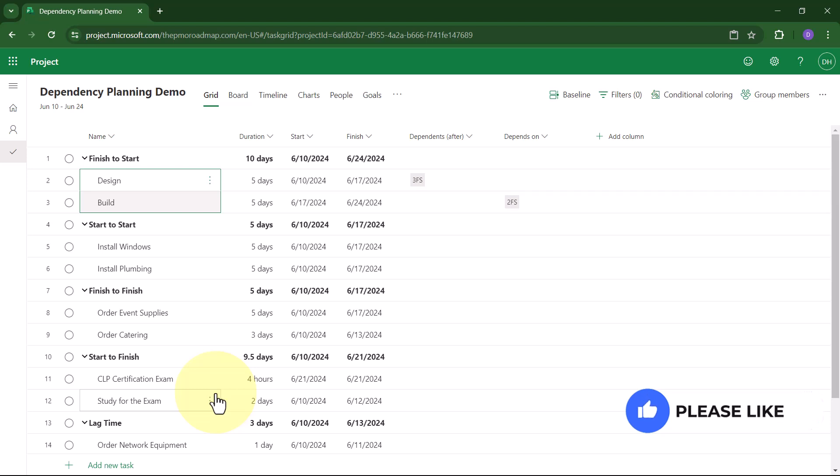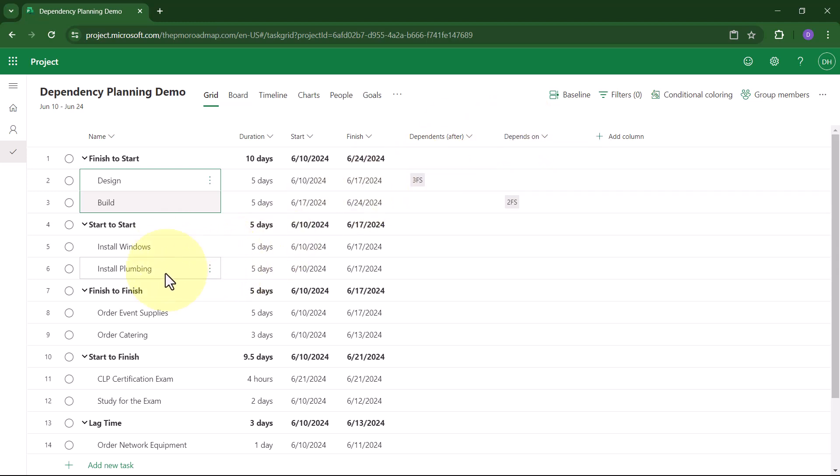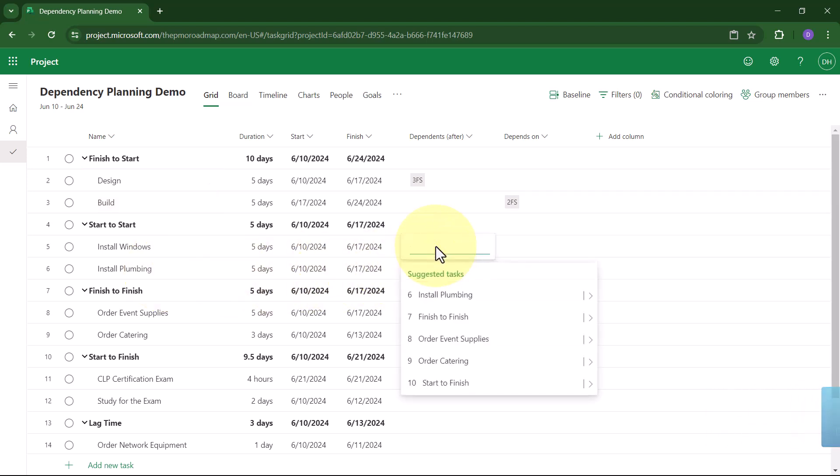All of the other dependency types, however, you're going to need to use either the Dependents After or Depends On field. So I've got two tasks, Install Windows and Install Plumbing, and I need them to start at the same time. Therefore, I need a start-to-start dependency. Here's how to set that. Click anywhere in the Dependents After field. Project for the Web will display a menu of available additional tasks. In my case, I want Install Plumbing.